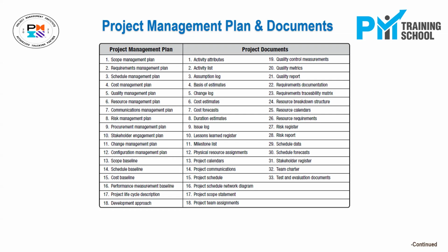They are also important, but not as important as the project management plan. So they will be referred to sparingly. They may be referred to when required, but they are not considered part of the project management plan. They are other documents, called the project documents, and they could be placed separately from the project management plan. If there is a change in the project, anything out of these could be amended as a result of that change. So when there is an approved change request, you will have to consider which management plans are affected by it and what should be changed.